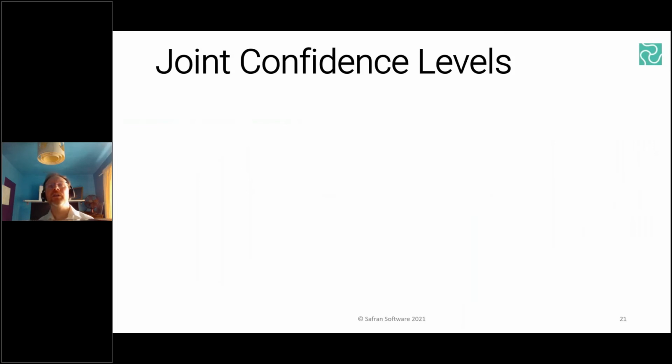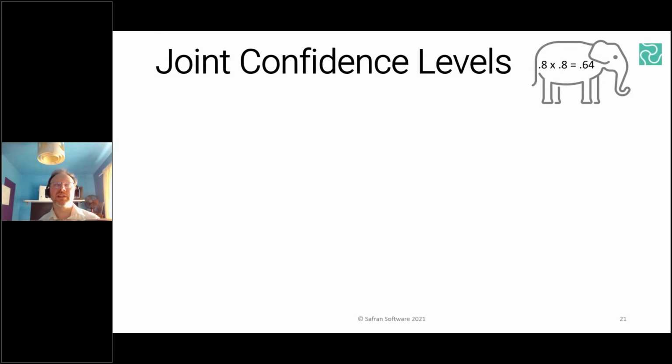So the power of having a fully integrated model shown on the scatter plot is that you can now talk about having joint confidence in your model's outputs. Previously in my career, if I was interfacing two disintegrated models together, I perhaps shouldn't have been claiming P80 confidence or even P64 confidence. As I said, this is quietly ignoring those feedback loops and correlated relationships that are occurring in real life, regardless of whether or not your model was sophisticated enough to be capturing them.